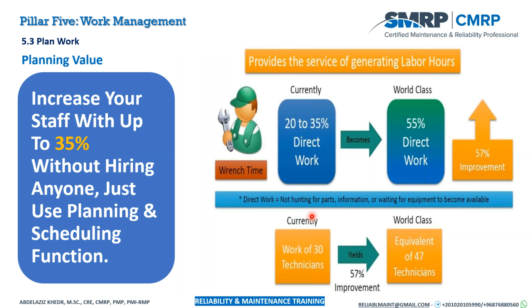A very important concept here is the wrench time. Wrench time is the actual on-tool time your technicians are working on site on real work. Based on this, we should improve our current wrench time from 20 to 35% up to 55%, which is the world class target.